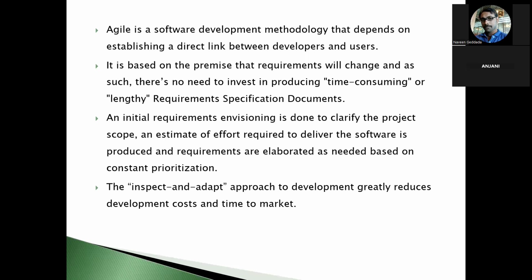The other one is, in the waterfall model, we will not accept any change in the requirement in the middle of the project. We also start working on the project only once all the requirements are defined. Only once the design phase is completed will we move to the implementation phase. Once all the requirements related to the project are documented, only then will we start working on the development phase. That is what the waterfall model has.